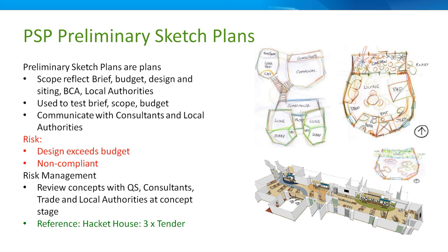What is it you want? Oh, we want this, this, this, and this. How many square metres do you need and what equipment do you need? Oh, yeah, okay. And then multiply it by $2,000, $3,000, $4,000 a square metre and see the difference. At 2,000 a square metre, we might be able to do a shed. At 4,000 it will cost this, and it's 200 square metres, so it's 800,000. Is that what you're thinking? Oh no, we only have a budget of 400,000.